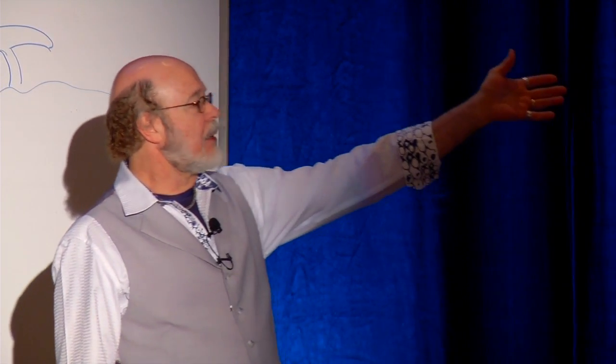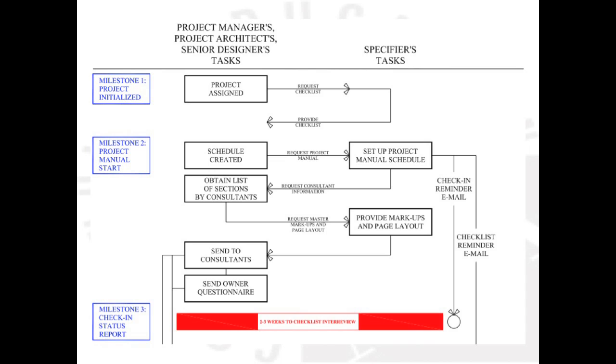But here you can see, at the very top, the project architect comes, he picks up his checklist, and this is really early. He just got told, you're going to be doing this project, and here's our tentative schedule. And he comes and gives me those dates, and I set them up on the calendar. I set up his milestones, and I enter it into the calendar for him. So then he gets that as an email that has all the milestones in it, and as calendar events that he can see pop up for him.